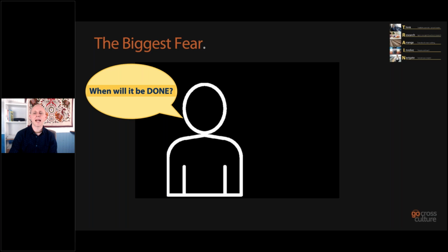And what we did to handle this is we actually said, just wait, let us deliver a few sprints, because this is a different way of doing things. And let us get the customer feedback rather than the project manager and the project timelines dominating this whole delivery process. Let the customer's feedback dominate the whole delivery process, and therefore it's a transfer of power from the project managers to the customer, and that's where the threat and the politics can come up, because they feel like they're losing control. So very sensitive, a lot of diplomacy required.